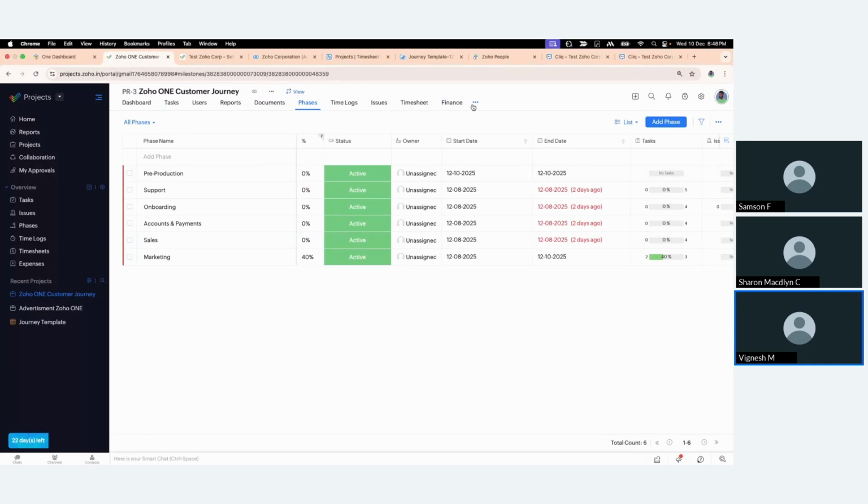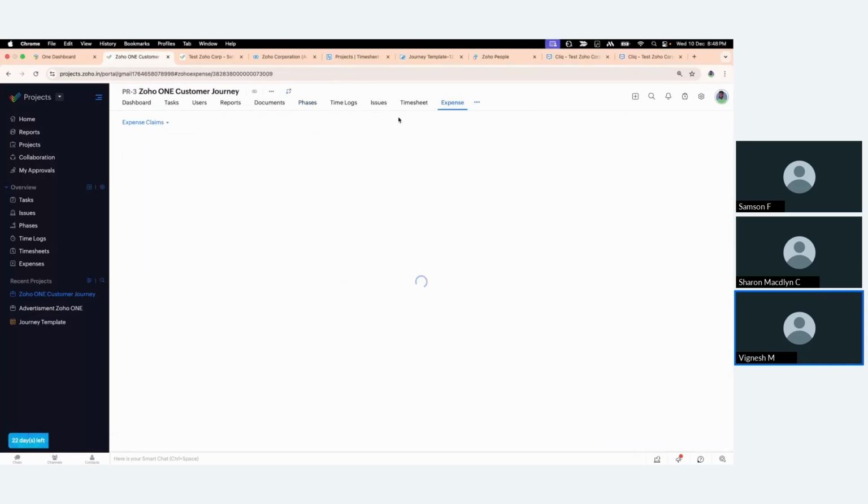And as part of the finance suite integration, we have Expense. So with Zoho Expense integration, you can record the project related expenses, say travel, purchase, miscellaneous costs directly from the project. Submit and manage these expense claims or reports, attach the receipts and have them approved and billed, all linked to the respective projects. So with Zoho Projects connected to Books and Expense, every hour logged and every cost captured flows seamlessly into your billing. No gaps, no guesswork.